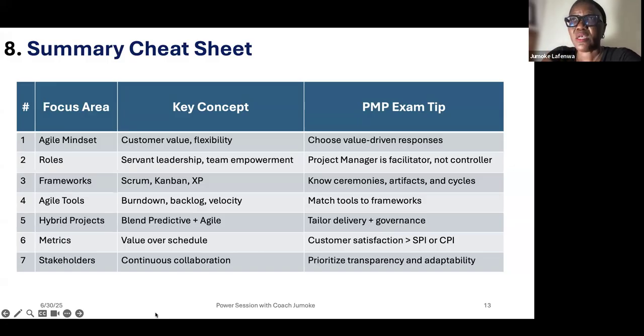So if it is equal to 1, it means when it comes to schedule, you are doing well. If it is less than 1, it means the planned value is bigger than the earned value. It means that you are going to have time overrun. That's you will spend more time than you plan. If you divide EV, earned value, by planned value, and it is more than 1, it means you will finish the project ahead of time.